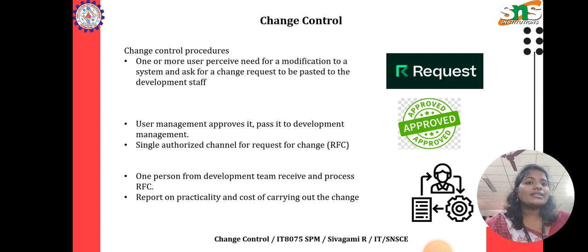There is a single authorized channel for requesting a change. One person from the development team receives and processes the RFC, the request for change. The person reports on the practicality and cost of carrying out the change.